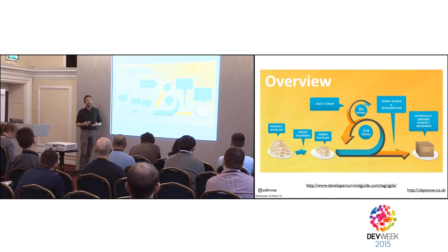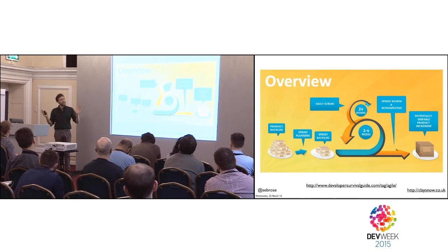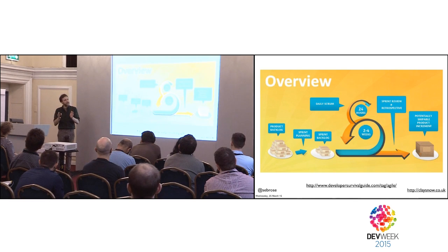The very best way, if you feel like you're a mature Agile team, the very best way for me is to actually not do Scrum, but to take some more pull-based, lean approach to stories, where you go, these are the sort of things that we want to do, and as we pull them off of our backlog, then we run a Three Amigos for them. And that minimizes waste. You're not doing any analysis on small items until it's time for you to start work on them. But it really demands a high degree of discipline and maturity in working with user stories and working in a responsive way. So there's lots of different places you can fit it into your process.